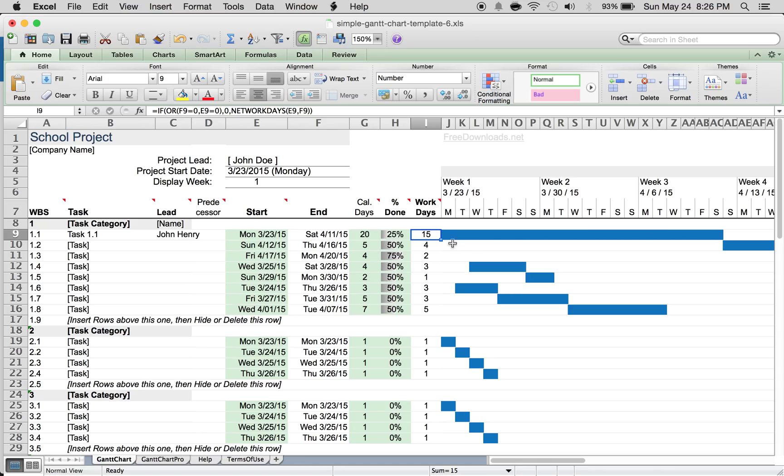Work days are just days Monday through Friday, not counting weekends. If you want to count the weekends, you can go into this formula and change it.